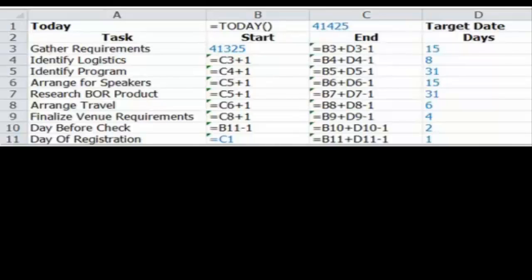Of course, once you get everything calculated, you can tweak the dates however you want to get a viable project plan. For example, if you know these tasks will take a certain amount of time, but the calculated completion dates of the tasks go beyond the target date, then there's some juggling to be done. So how do we get our project plan to automatically tell us when things are past due? Well, we can use conditional formatting with a formula. That will give us this very cool functionality.